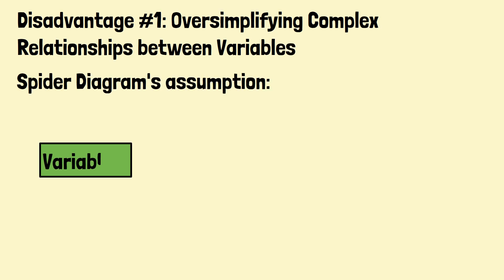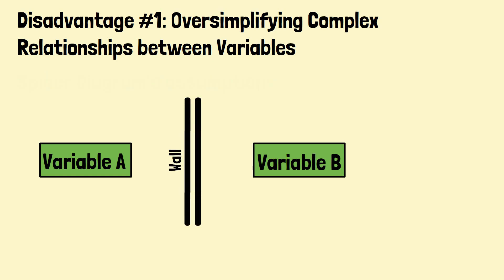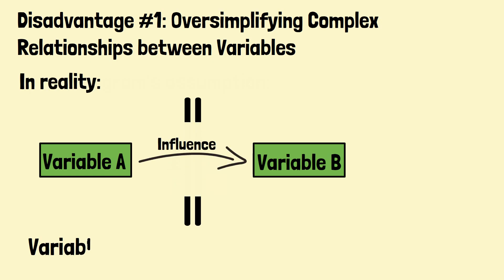The SPIDER diagram assumes that each factor is independent, and changes in one factor will have a direct impact on the outcome. In reality, the relationships between variables may be much more complex and non-linear.